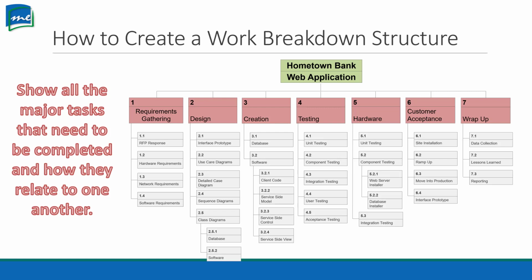So we want to have a work breakdown structure depending on how big your project is. Let's say your project's a year long, perhaps you want to use one week's worth of work as a breakdown. So if something is going to take longer than a week, maybe you want to break it down and see, okay, if it's going to be 2 days for this part, 3 days for this part, 4 days for this, break it down. If it's going to be like a month, maybe you break it down into number of hours. It really depends on how detailed you want to get.